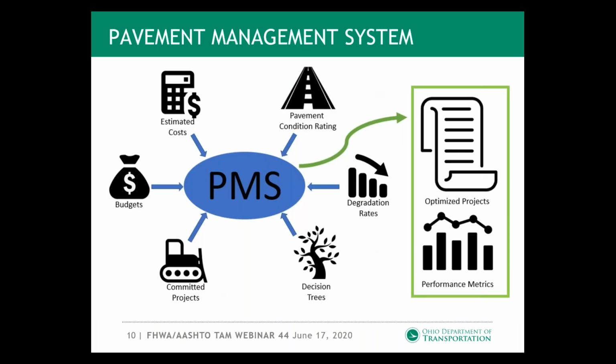I mentioned the pavement management system. Again, using pavements as an example, projects are produced utilizing our pavement management process. Once this optimization process has been determined, they're entered into our Ellis system, which is our project planning, management, and accounting software. This is where the districts enter their information and prepare it for what will eventually be the list of projects that will be used for the STIP.